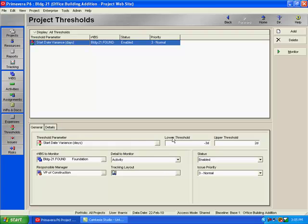Next, I'm going to select my lower and or upper threshold values. I've selected a minus three for my lower threshold. So any activity that is three or more days late from its baseline start date will generate an issue. Conversely, any activities that start earlier by two or more days will generate an issue as well. Anything in between those values would be acceptable or tolerable.